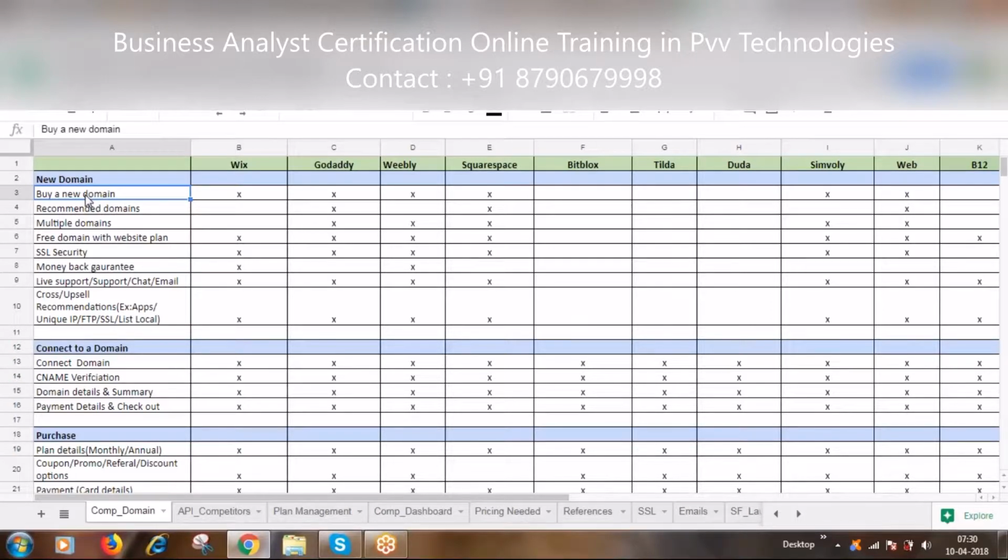I will have a list of items that are available. Then I will try to prioritize the items. Then I will try to include these priority items into one sprint, the current sprint. Then the next list of priority items in the next sprint, and so on. So this is how the product backlog items are prioritized, and then we reconcile the items depending upon the need and the market value, and then try to impose them into each and every sprint depending upon the need.